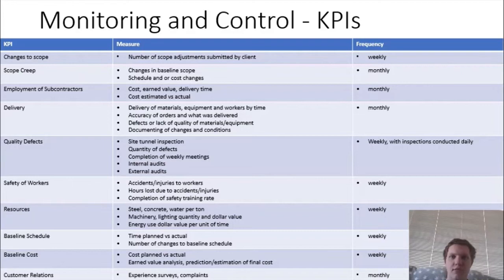The Northside Storage Tunnel project will be constantly monitored and controlled throughout its life cycle by employing a number of processes and tools. Key performance indicators were developed for this project, encapsulating the essential metrics for the project's success. The KPIs, while broader than the PIs, will allow us to effectively benchmark project progression against similar projects. These KPIs are separated from the PIs based on their ability to monitor the project's progression regarding the developed objectives, as well as possessing targets, such as milestones. These KPIs will be monitored on a weekly or monthly basis.